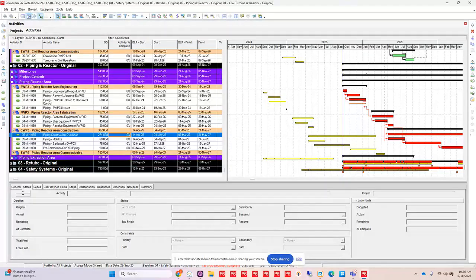Some other great features that we have in the way of activities is that when you start to update, what's going to control your activity? Is your budget fixed? So you only have so many man hours that you can use on a particular activity. Or maybe you have to have a fixed duration on that activity.